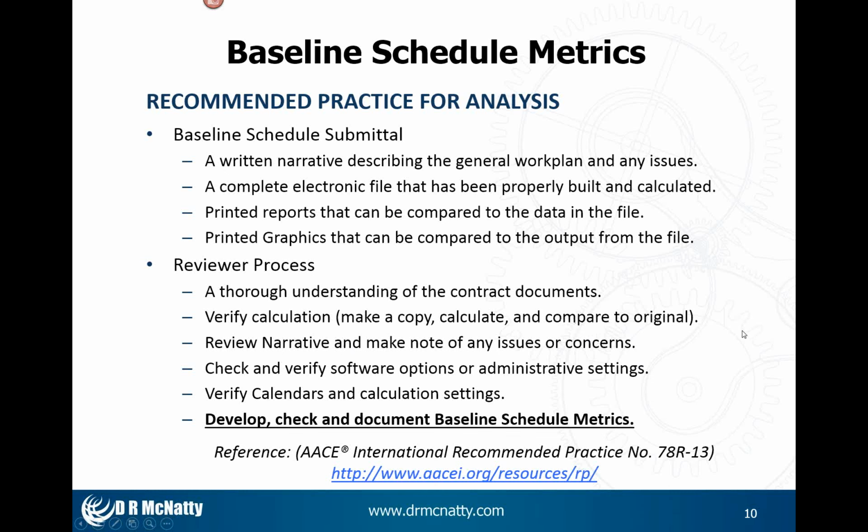If there's a change, that means that something happened. Either something was changed in the schedule after it was calculated, but before it was backed up and given to you, or you may have messed it up when you imported it, especially into P6, if you don't know how to deal with calendars properly when you're importing a P6 schedule into a database that was not the one that it was originally created in.